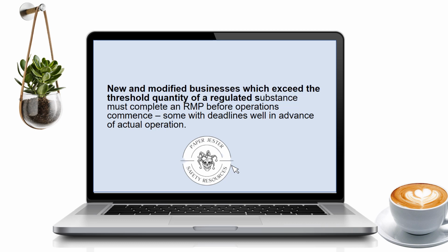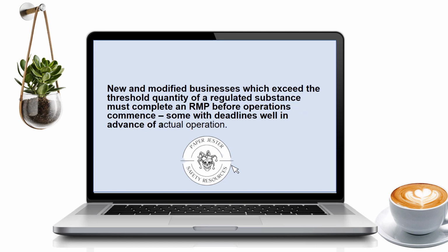New and modified businesses which exceed the threshold quantity of a regulated substance must complete an RMP before operations commence, some with deadlines well in advance of the actual operation. Early coordination with your CUPA can be critical for smooth startup.